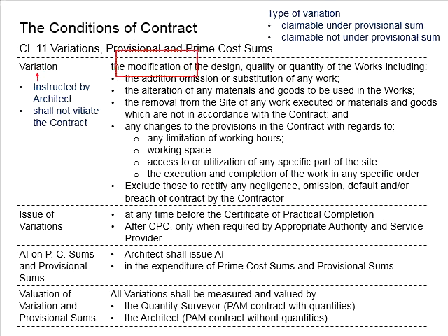With these modifications, that means there will be some changes made onto the work and the scope of the work, which was initially agreed between the contractors and the employer. Normally, these kinds of variations will have to be instructed by the architect. The modifications without the instructions of the architect will not be recognized, and as a result, the contractor is unable to claim for the work.